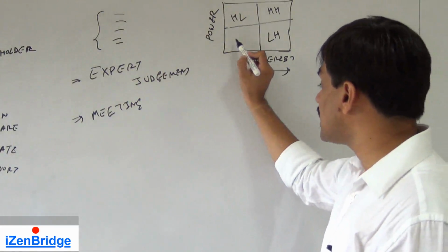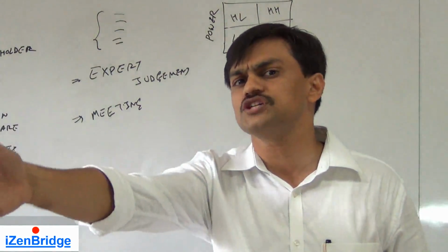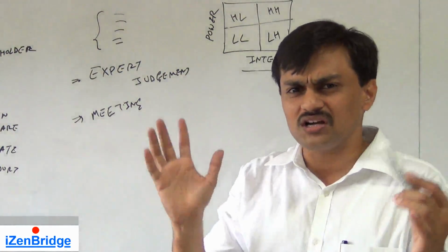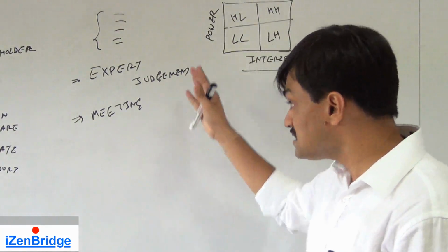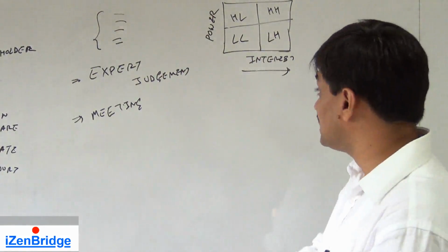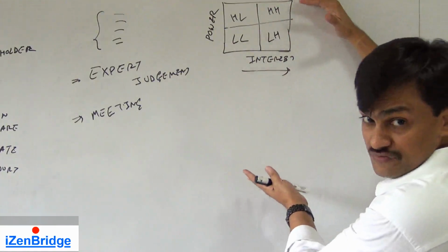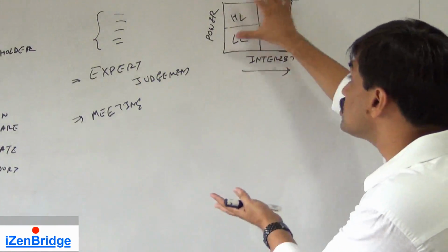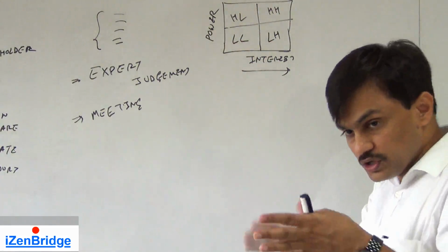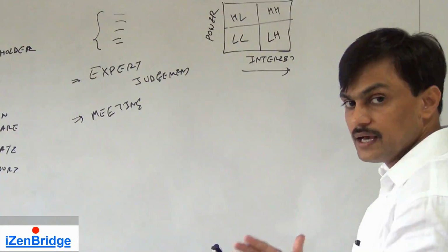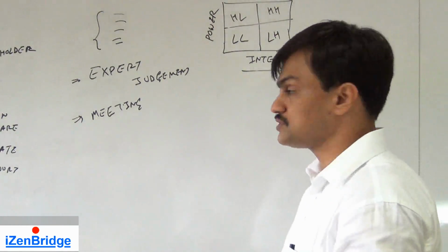And there could be other types of people who are low, like the people who are in another project team. They are not that much interested and they are not that much influential for your project, but they are in some way impacting you. That's why you have identified them in your list. So this is a type of classification which you can do, and on the basis of this classification you can identify a category for those stakeholders, and finally you can identify a strategy to manage or engage those groups.